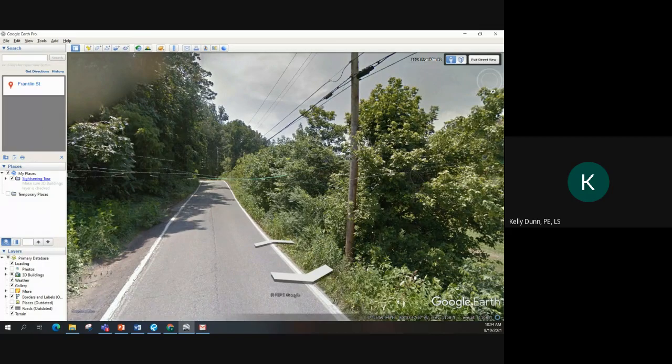Relocation of utilities can be very expensive, and we would suggest further investigation into the cost to relocate these utilities. In most situations, it would appear that $156,000, as shown in the estimate, would not be adequate to cover their relocation, if not falling within an existing franchise agreement with VDOT or the locality.